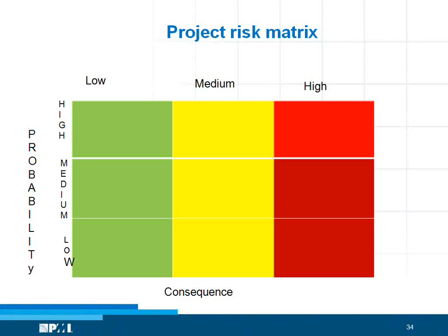That means, what is the probability of a particular event happening and what is the consequence of it. You can classify them and put them in these boxes depending on the consequence as well as probability. The one which has got the highest probability and the highest consequence is the one you would attack first in terms of how do I mitigate this particular risk.